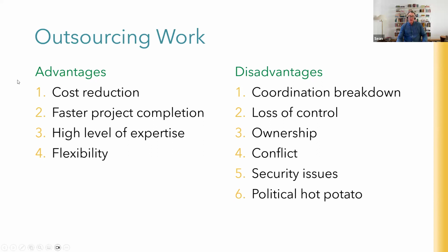So obviously, in terms of some of the advantages, there can be a cost reduction if it would cost you too much to get those skills or to upskill people or to buy the hardware or whatever. So it can just be cheaper for you if it's a one-off cost for your project. It can also lead to faster project completion. The schedule moves along faster because you can get those resources now, or that thing now, rather than having to build it yourself and divert people away from other work.